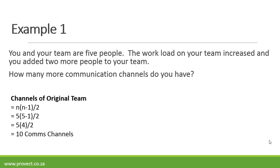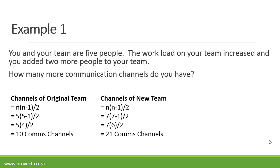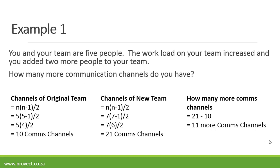Now if you add two more resources, you've got seven people on the team. It's seven times six divided by two — 42 divided by two is 21 communication channels. How many more communication channels are there? It's 21 minus 10, which is 11 more communication channels.